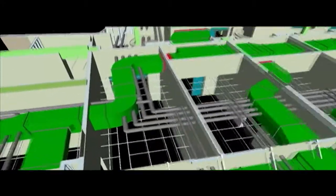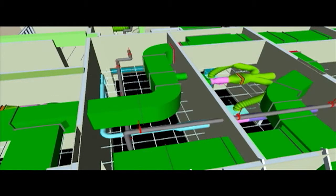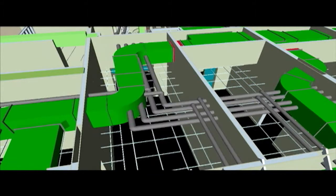Other specific BIM technologies include clash detection, more efficient fabrication of building components, and early detection of spatial conflicts. Clashes are highlighted on the 3D model. We really feel like this improves the quality of our design, to be able to use BIM, work it all out together in the design and construction detailing phase, and then not have to have problems later in construction that you have to react to and make fixes to. Much better to plan it out in advance.